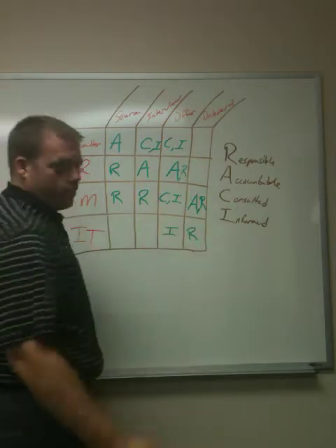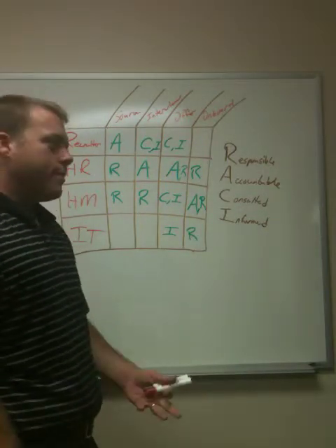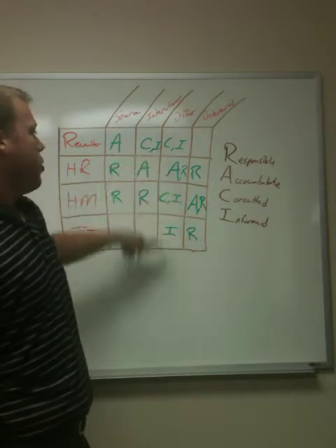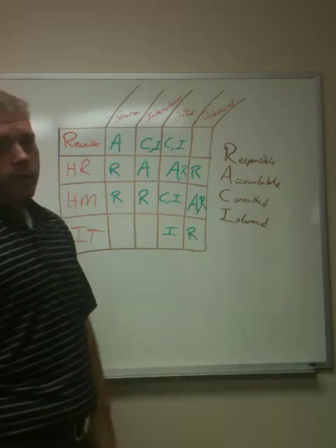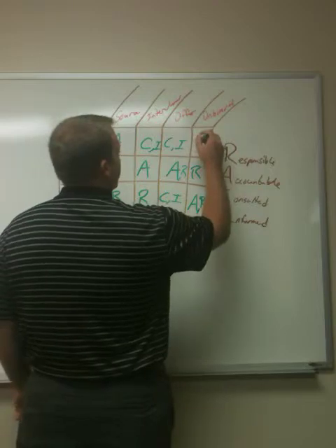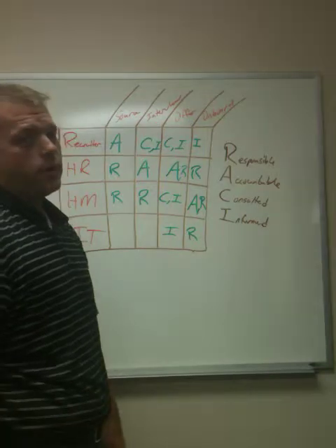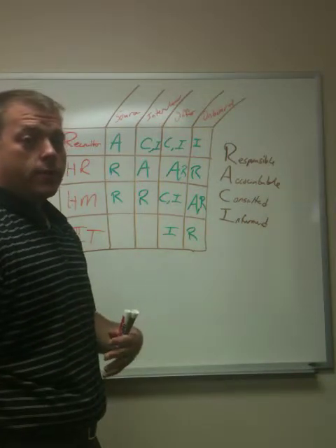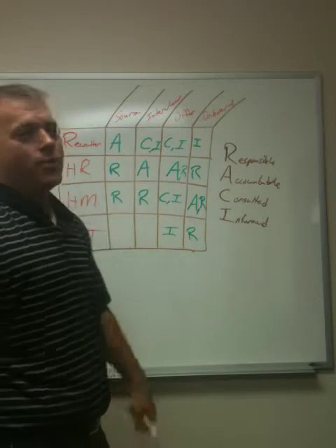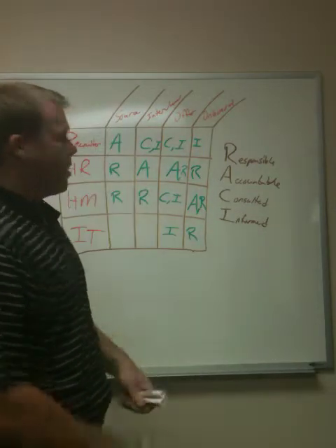Is HR part of onboarding? Of course they are. And what about your recruiter? Are they involved in onboarding? Some people like to have the recruiter come in as that soft handoff, but usually that's been done, at least the way we're set up here, earlier in the process. Otherwise, they'd be doing the offers and be part of the onboarding. So in this case, we're going to say that they're not part of it, but we are going to inform them after we've started the onboarding process. Not after it's done, but after we've started. Because that's, again, another one of those handoff pieces so that the recruiter knows not only did we source somebody, not only did we interview and make them an offer, but they actually showed up for day one, which is always a nice plus.